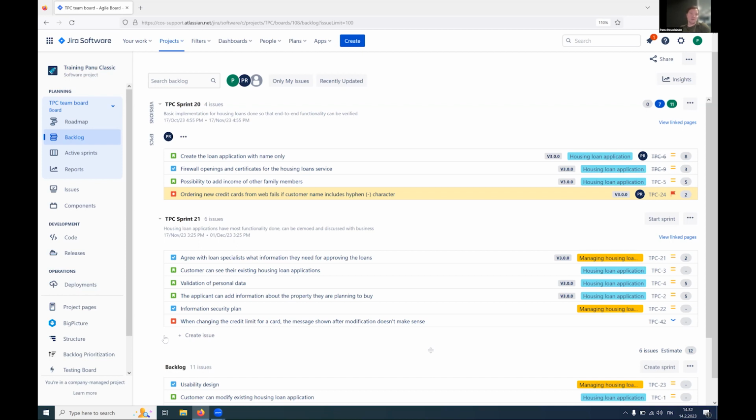If we have 50 items per sprint, my first guess would be that maybe the items are actually for individual developers more than for the whole team to implement. That's one of the anti-patterns that we often see, where things get very complicated for the teams, the sprint plannings are very difficult, and the sprints never realize the content that we planned into them. Planning is difficult because you need both the front end and the back end of this thing, and they are separate tasks instead of within one story, etc.